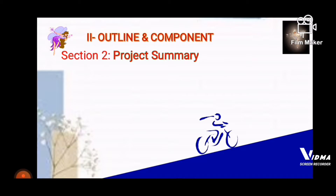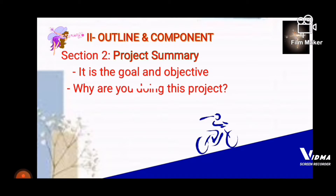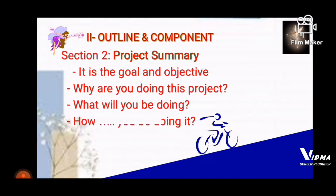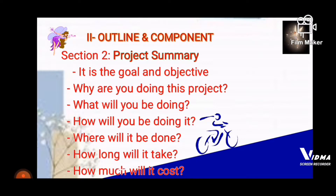Section two is the Project Summary. The things found in your project summary start with goals and objectives, which address: Why are you doing this project? What will you be doing? How will you be doing it? Where will it be done? How long will it take? And how much will it cost?